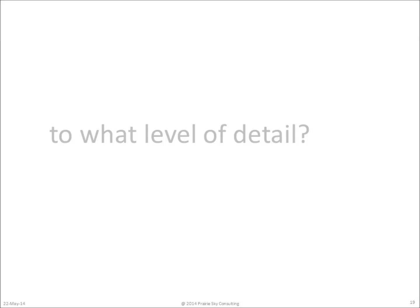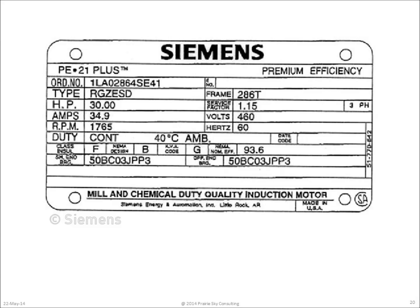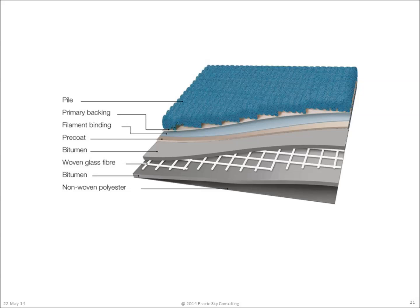So rather than shoot for the moon and make the contractor type in everything, the owner's COBE specification really needs to consider what is currently being provided in the contract and use that as the basis to gather the COBE data that can be used to meet the level of detail needed. Getting nameplate information for equipment is pretty straightforward — the nameplates are there, and the requirement to deliver the nameplate data is directly in most construction contracts.